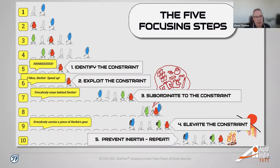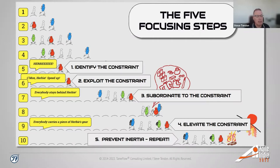There is a fifth step, not illustrated in the story, called prevent inertia. It means that Herbie the constraint could move — for instance, Bluey, the fastest guy who is now last, could have an injury that prevents him from walking, and all of a sudden he becomes the slowest scout. At that point we start over: identify, exploit, subordinate, and elevate.